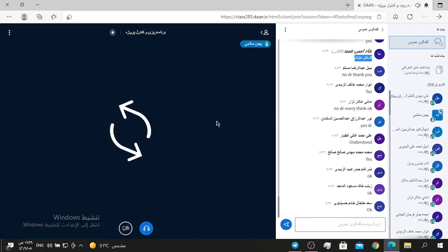We use finish to start, FS, more and more in the schedule network. The SF relationship is very rarely used because this relationship is so hard. But it is included to present a complete list of the PDM relationship types.